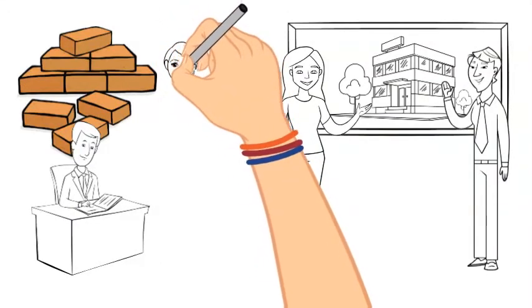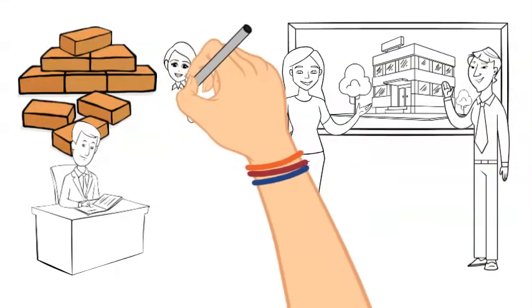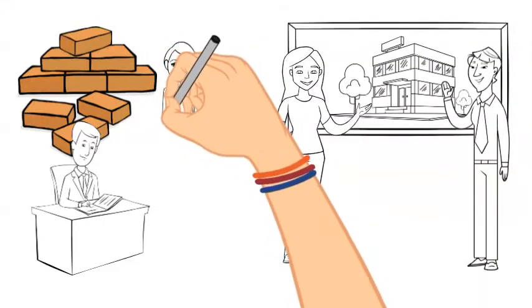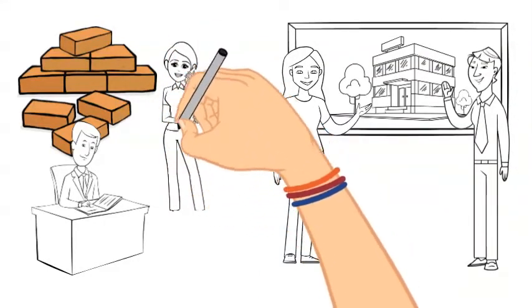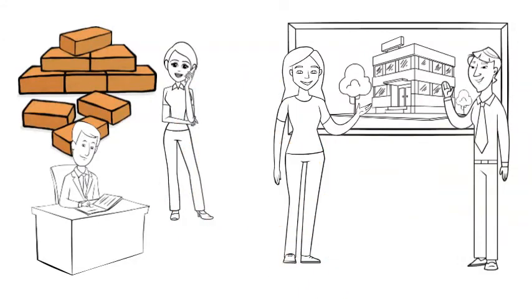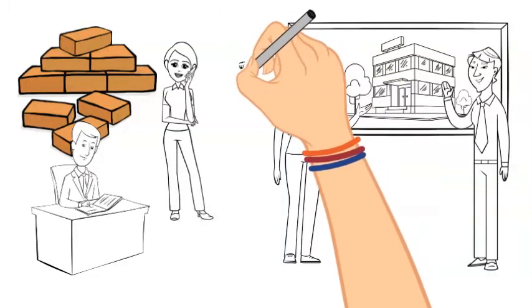The project buyer at this point, once they know how many bricks we need, is going to start phoning around and getting different quotes on the bricks. Now, once they've got all those quotes, they'll also look at the reliability of the suppliers as well. Whilst you might be able to get some cheap bricks, they're no good if they're of a poor standard or they don't turn up on time.